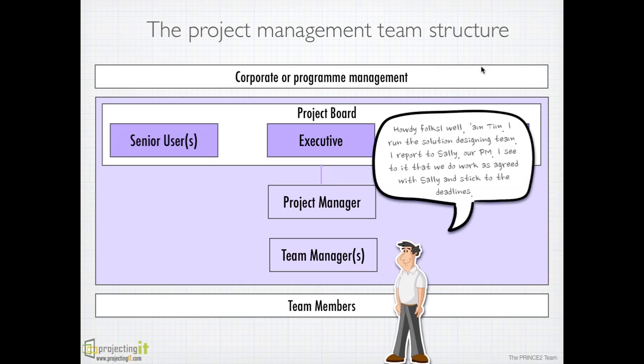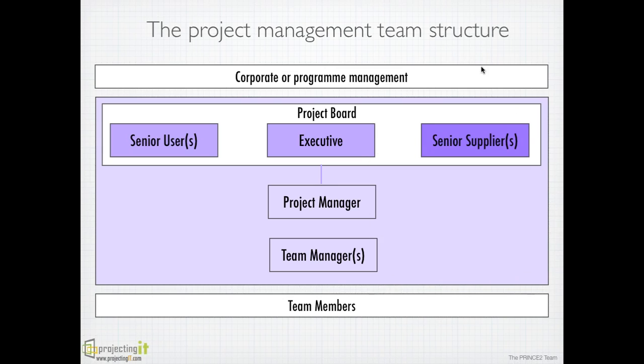Ensure that the teams are doing the work as required, get your deliverables checked and quality controlled. Also, keep the project manager informed using regular checkpoint reports. And when all the work is completed, hand back the deliverables and work package to the project manager.